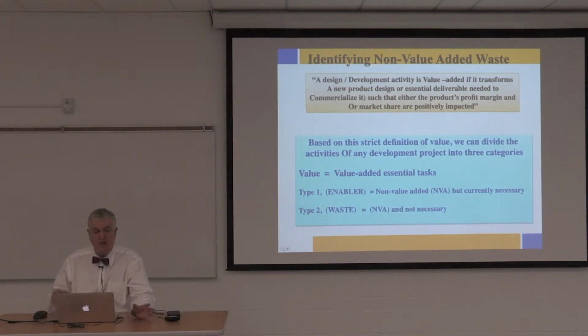Identify non-value added waste. One of the fundamentals of non-value added, which you learn in manufacturing lean, is: would the customer be willing to pay for that particular activity? They certainly don't like paying for you to redo the design. So if it costs you $10,000 to design at the concept stage, and you put it to detail, and suddenly the detail design people, the preliminary design people say, oh, something's wrong here, this system's not connecting with the other system, then you have to redo that concept design, and it's costing another $5,000. Your customer will be very upset if they're having to pay for it. And if they're not having to pay for it, you're losing it. So your owner, the owner of the company, your shareholders, they're your customer as well. They won't be too pleased.